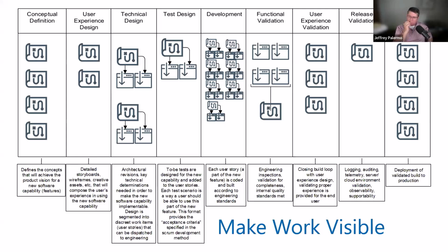Bottlenecks tend not to be in actually writing code. Bottlenecks tend to be in time spent making decisions. A tool like this helps you pull the design decisions out from the status where we're writing code, so you can see and reason about where all the time is going.